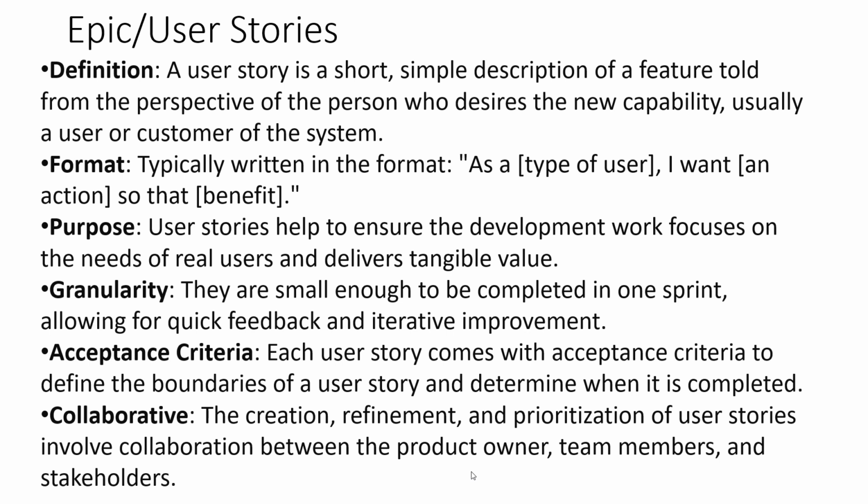And then each story comes with an acceptance criteria, i.e., how are we going to test this to determine when it's actually completed. And then during the sprints, these user stories are worked on in a collaborative manner with everybody on the sprint team working, verifying, or possibly doing something with this, and working with the product owner and the stakeholders to make sure that that initial definition of the user story is being completed and is actually delivering the value that was intended when the story was created.